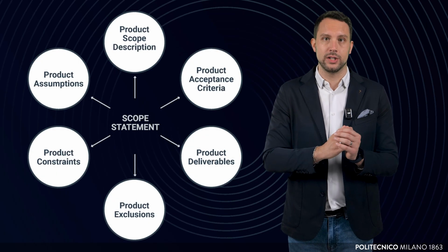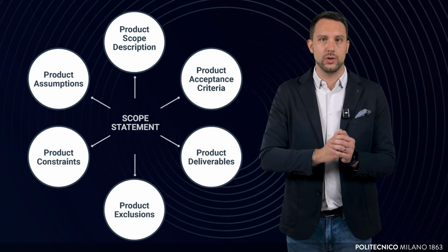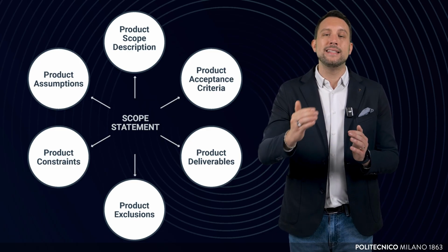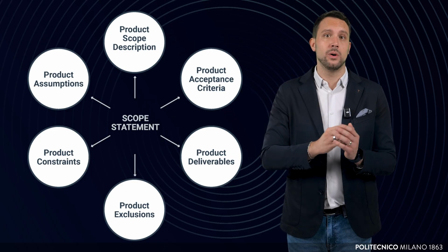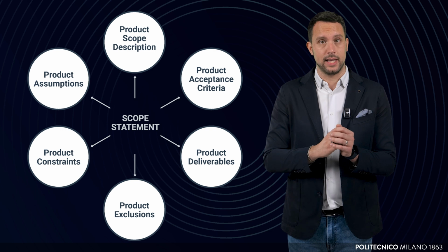In the initiating phase, the project manager has the responsibility of defining the scope and deliverables in alignment with the customer. For the MOOC platform app, the scope might include features like user registration, course enrollment, video streaming, and a progress tracker. These deliverables are defined in a detailed project charter or a project scope statement, ensuring alignment among stakeholders. The project's feasibility and alignment with organizational goals are assessed, and the risks are identified at this early stage.